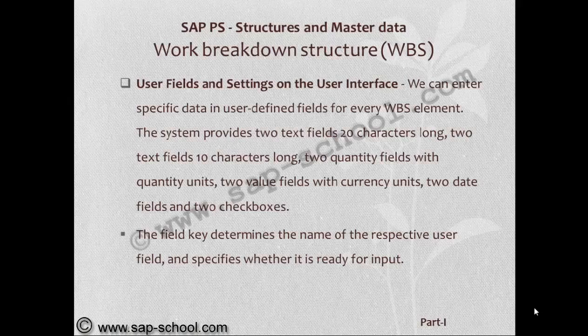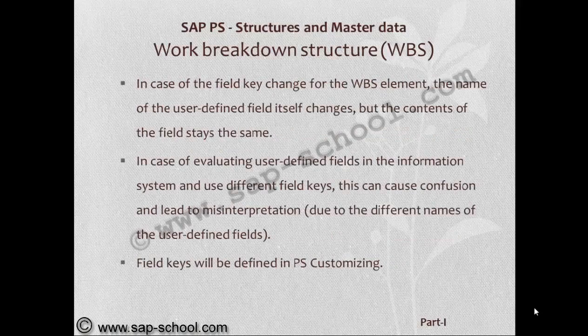The field key determines the name of the respective user field and specifies whether it is ready for input. In case of a field key change for the WBS element, the name of the user defined field itself changes, but the contents of the field stay the same.